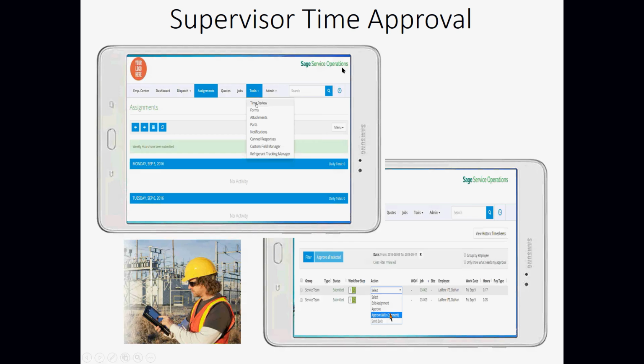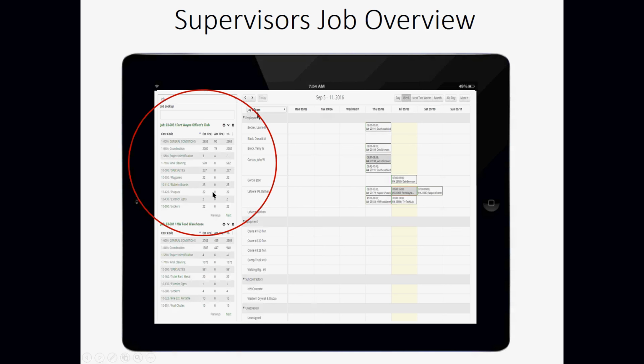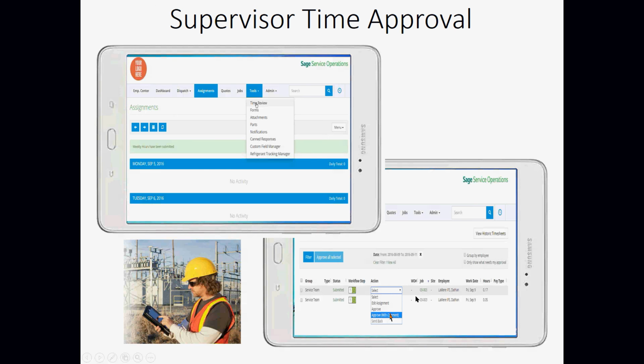Now in the next screen, what we're talking about is approvals, because you have the employees putting that time in. As I said, you don't want them putting it straight into a job unless they've got the authority to do so. But out in the field or back in the back office, it doesn't matter. If you're in the field and looking at it, you can bring up all your employees' time and just say, yep, I approve it, or no, I don't approve it, or no, I want to change it. What this is doing is submitting it into the job, so that it shows up on the scheduling here where you've got the actual hours. It's showing up in the back office. If payroll was the next day, it would already be sitting there available for that employee to get paid.